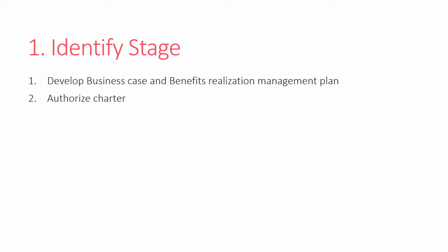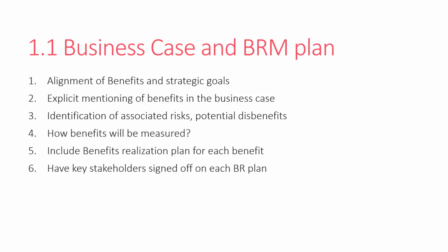Right, the identify stage has two important activities. One is developing a business case and developing a BRM plan, and the second one is authorizing the charter. Let's look at the first one, the business case and BRM plan. Actually, both go hand in hand, but both are independent, official documents, right?